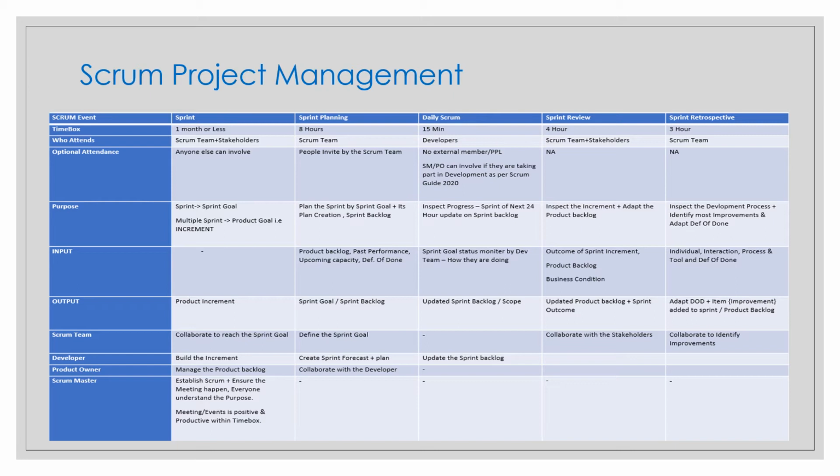Okay, so the scope can be negotiated, but the sprint goal will remain the same. In their daily scrum, based on the discussion, they make changes to the sprint backlog, not to the goal. The scope of the sprint backlog is the amount of work selected by the developers. In other words, like the selected product backlog items, the scope is flexible and can be modified during the sprint.